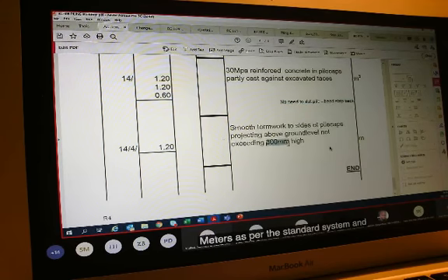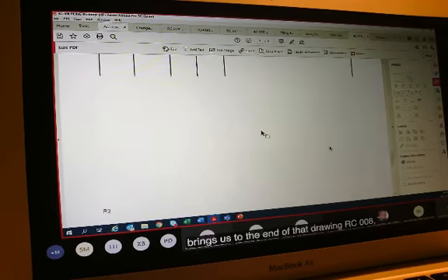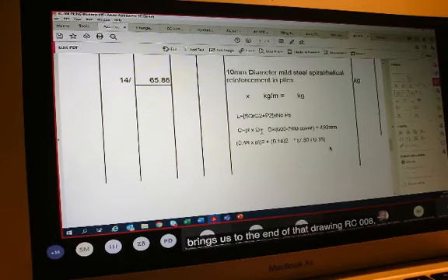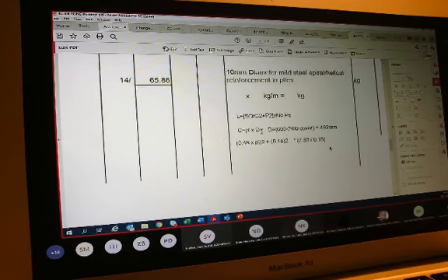Remember, a very important note, there is no need for us to deduct the pile because we have already stripped back the pile to expose it in order for it to form part of the pile cap, as Madolo said earlier, in order for that bond to be formed there.